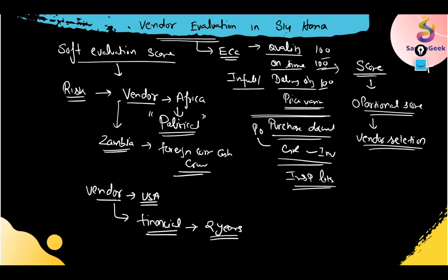So at any time it can go bankrupt. If this vendor goes bankrupt and you are getting a supply from that vendor, and suddenly the vendor stops, getting a new vendor developed for a specific product is not an easy task. It takes months to develop a vendor, and it takes again a month or a year to make it stabilized to have a good quality product coming from them. That is a very long process. If that kind of fluctuation happens and you are not prepared, you have not analyzed it, then your supply chain, your whole business, can be impacted.